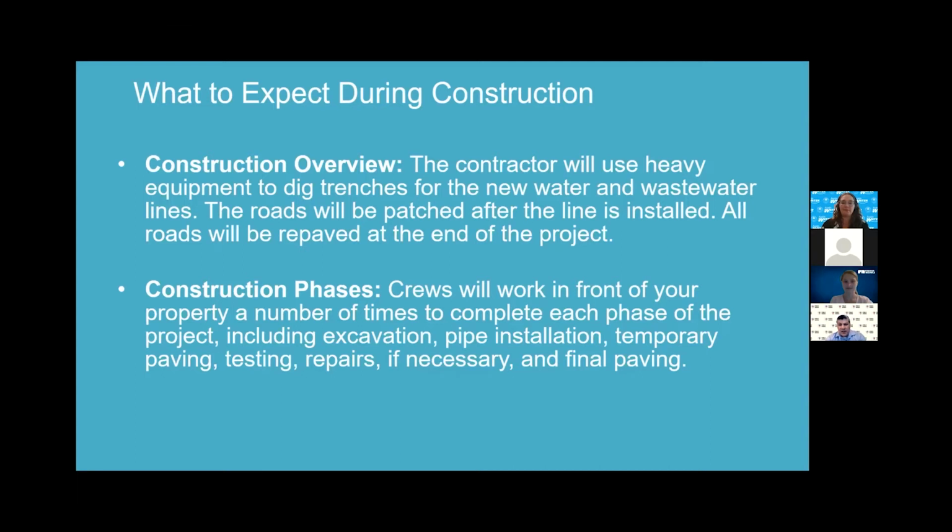Now, keep in mind that the construction will occur in phases, which is why you may find crews working in front of your property several times to complete each phase of the project. And that may include excavation, pipe installation, temporary paving, testing, final paving, and in some instances, repairs if necessary. Next slide.